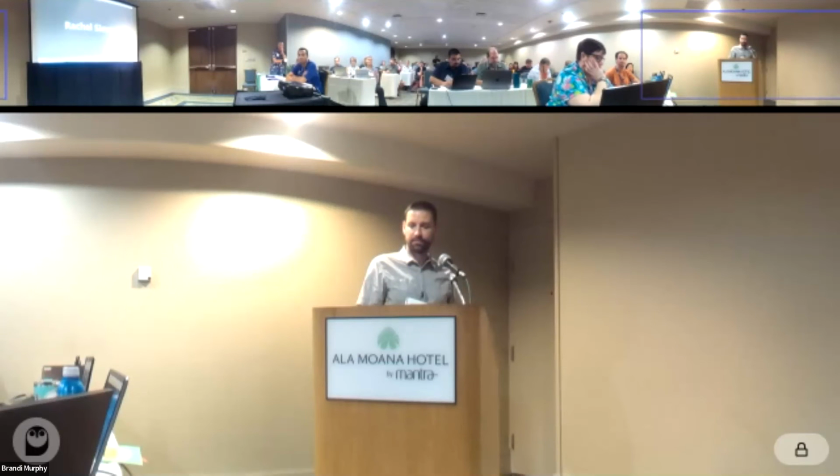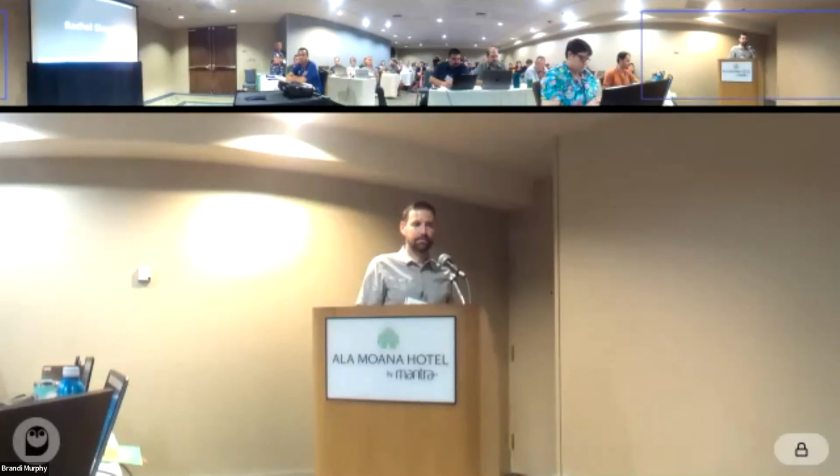And keep in mind, we're talking about a day to rack it and stack it and verify connectivity, but that doesn't translate to a day of downtime. The way we sequence the installation is we bring up all the WAN side first. You make sure all the tunnels and all that stuff is up and running. The part where you actually have your cutover, where you might see some outages on the network, is going to be pretty short. When we were switching things over on Endeavor, it took about 15 minutes or so.